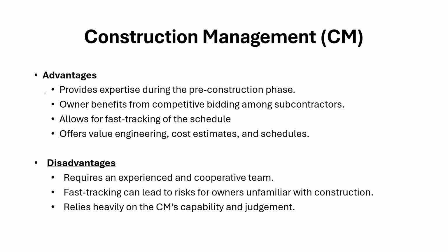The main disadvantages of this construction management process are that it requires an experienced and cooperative team, and the construction manager's fee may be higher than traditional methods, especially for CMAR, since the construction manager is assuming the financial risk. The project's success heavily depends on the CM's expertise and management capabilities, and fast tracking, starting construction before design completion, can often lead to errors and disputes if not managed well.